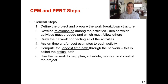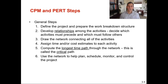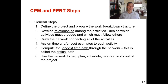The steps for CPM and PERT are exactly the same — six steps. First, define the project and prepare the work breakdown structure. Second, develop the relationships among the activities — decide which activities precede and which ones must follow: what's step one, step two, step three? That's step number two in our process.